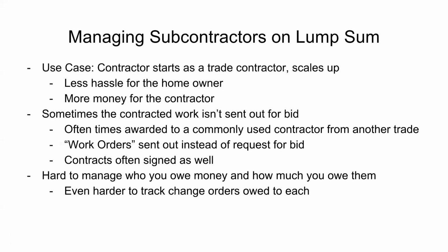When you're hiring lump sum contractors, this is going to be managed differently in our system, in that it's not really costed via time submitted by the contractor, but it's actually submitted based off of how many bills are entered into the system against their contracts. Just to cover a use case of this, we see this every day.